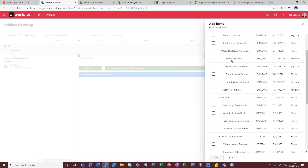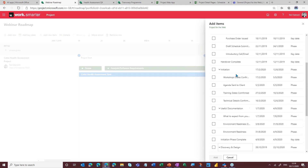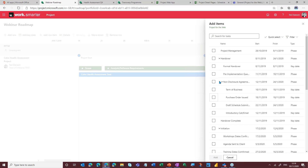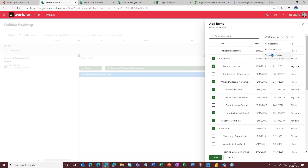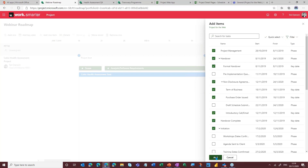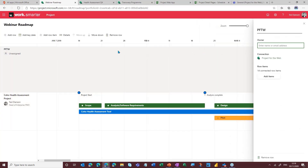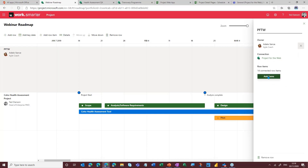The way in which we bring tasks in for Project for the Web differs very slightly to how it happens for Project Online. Whereas with Project Online we've actually got to search for tasks or go to the plan and bring items back through, with Project for the Web we can actually see all of the tasks listed out for us to select from. I can either select things manually by ticking the boxes or search for specific tasks — quite handy where you've got a very lengthy project. I could do a quick select of all milestones, then select all summary tasks, or top-level tasks. We've selected everything and we're now going to press the Add button. For this one, we're going to make Adele the owner — not the singer, but the agile coach Adele.